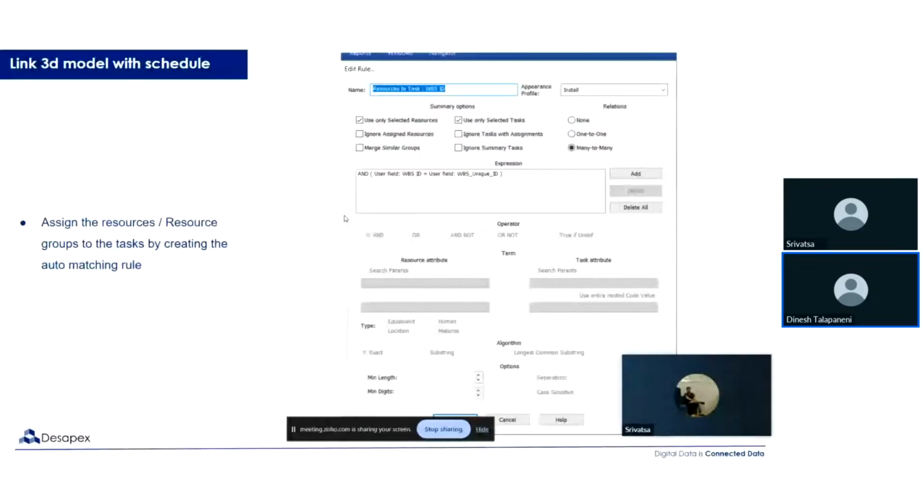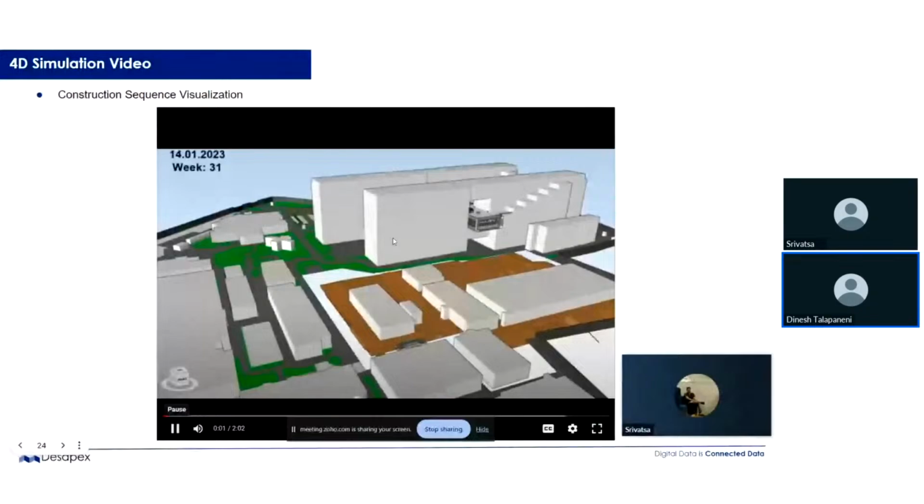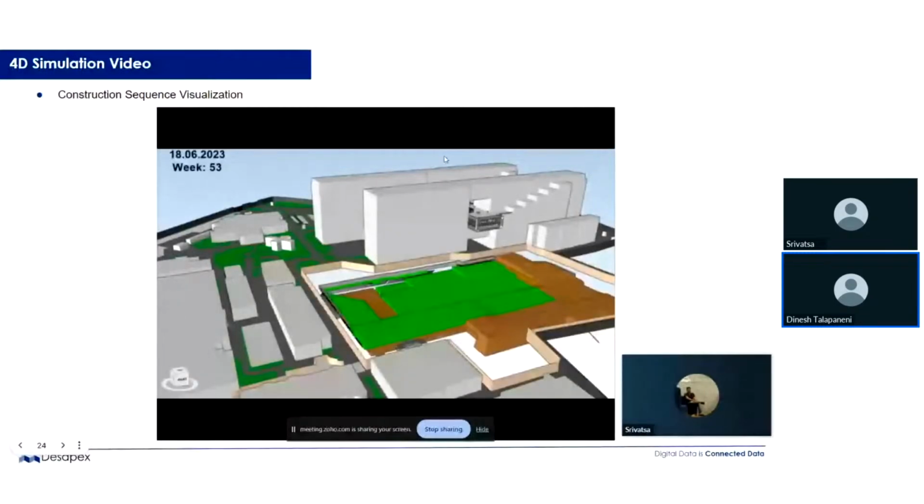I have some videos to show. So this is one of the projects that we are doing here in Bangalore. It's very goal-oriented in terms of virtual construction. What you're seeing is some of the demolition activities happening on the site. We actually modeled the entire earthwork by doing laser scanning. We got the exact profile of the ground, and it's been modeled in layers and divided into areas, and based on that it keeps running the virtual construction.